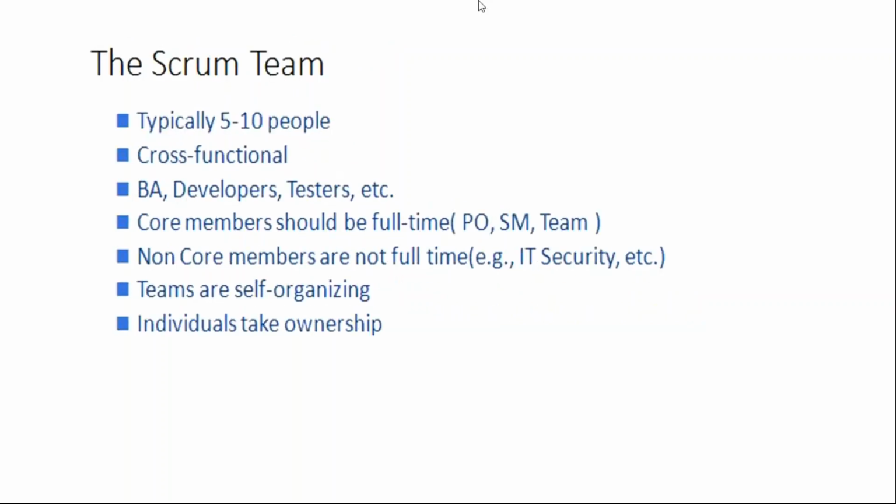And the last is the Scrum team. So again, I'm giving an example only from a Scrum perspective. It's not that exactly it has to be within 5 and 10. In my current organization, I'm seeing there are members over 13. But again, it should not cross 20, because the daily stand-up is a time-boxed event of 15 minutes. If you have 20 members in your team, and you dedicate even 1 minute for each update, it is going to take 20 minutes. That's the result.